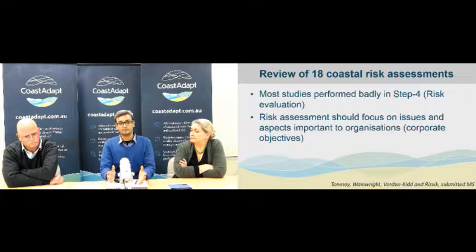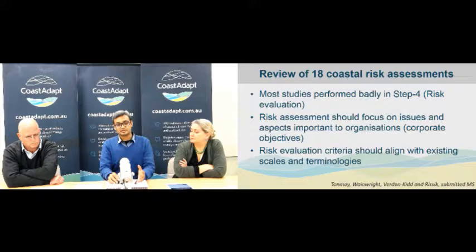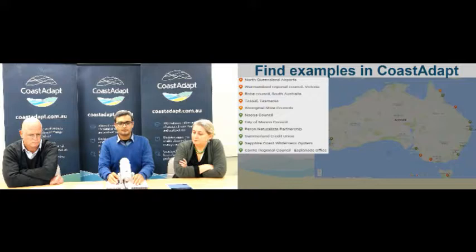If climate change risks are evaluated against a new set of criteria rather than organizations' existing risk evaluation criteria, then it's difficult. It becomes challenging to mainstream the identified risk within organizations' business process. So the advice is stay as close as possible to your existing organizational risk criteria, terminologies, and scales, rather than adopting something new. So that's a quick overview of a second pass assessment.